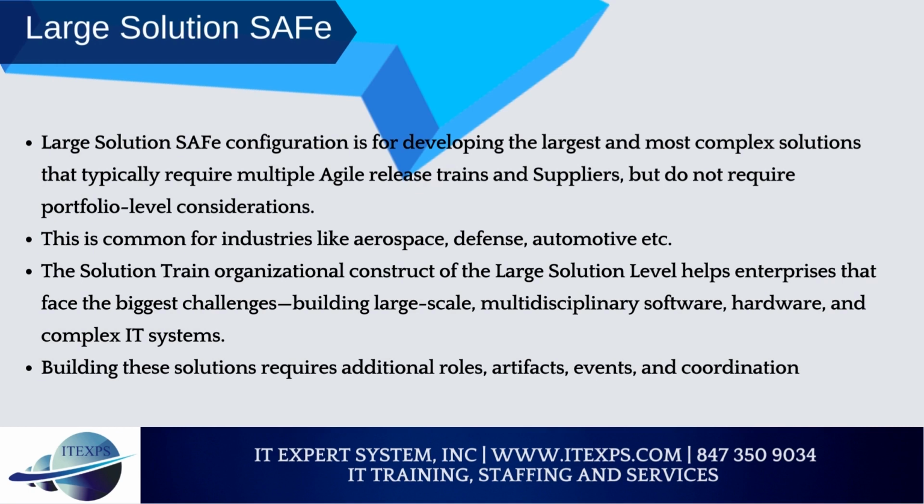Large Solution SAFe. The Large Solution SAFe configuration is for developing the largest and most complex solutions that typically require multiple Agile release trains and suppliers, but do not require portfolio-level considerations. This is common for industries like aerospace, defense, automotive, etc. The solution train organizational construct of the large solution level helps enterprises that face the biggest challenges building large-scale, multidisciplinary software, hardware, and complex IT systems. Building these solutions requires additional roles, artifacts, events, and coordination.